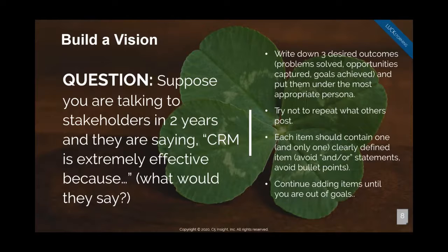leadership team. And by the way, leadership team might be, when you're at this stage, a representative sample, maybe 1 or 2 reps, maybe 1 or 2 managers, maybe 1 or 2 executives, your project manager, your business analyst, maybe someone from IT. That's okay. Not too big, no less than 5 people, no more than about 9 people, but this is your leadership team. It might be the only team you meet with, depending on your size, or you might have a bunch of subsequent follow-up meetings after you get started.